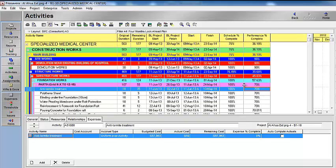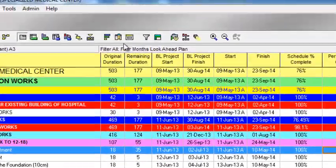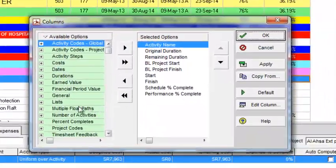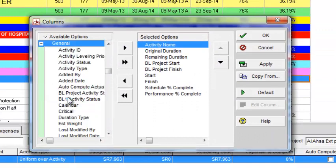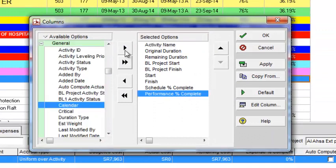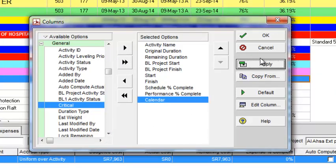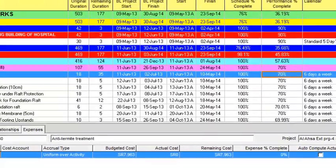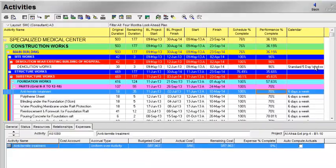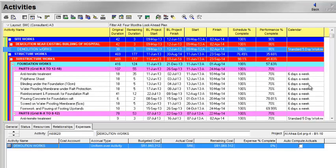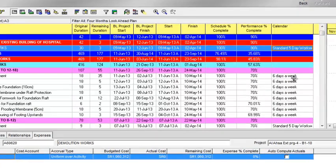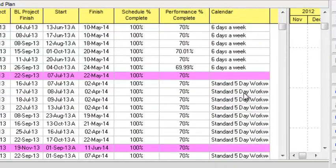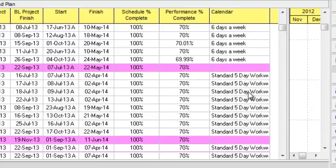What I will do is go to the columns and add the calendar. Now here it is showing that to this activity, the calendar is assigned as the standard five days. To this area, the calendar is assigned as six days a week. And in this WBS, the standard five days calendar is assigned.